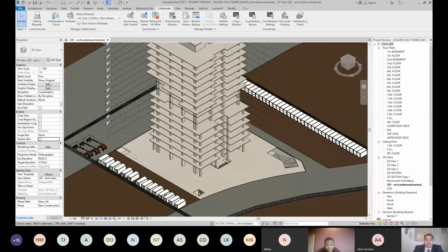We calculate every item cost like this. The total cost consists of 4 items: material cost, labor cost, subcontractor cost, and equipment cost. This is the total.